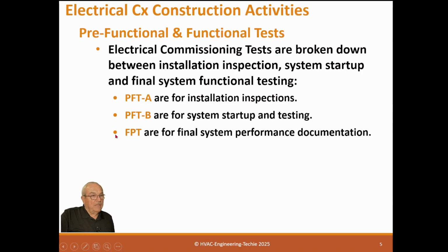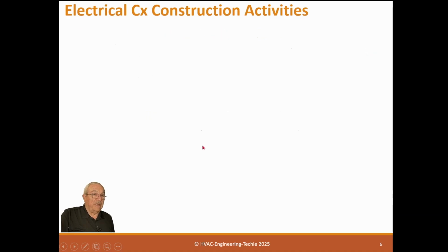An FPT, or functional performance test, is the final system performance documentation of how it's supposed to work and if it is working correctly. Now, mechanical, it's real obvious what these are, and there's a lot of time and effort that goes into these. In electrical, these are much simpler, still important, but much less rigorous than mechanical.